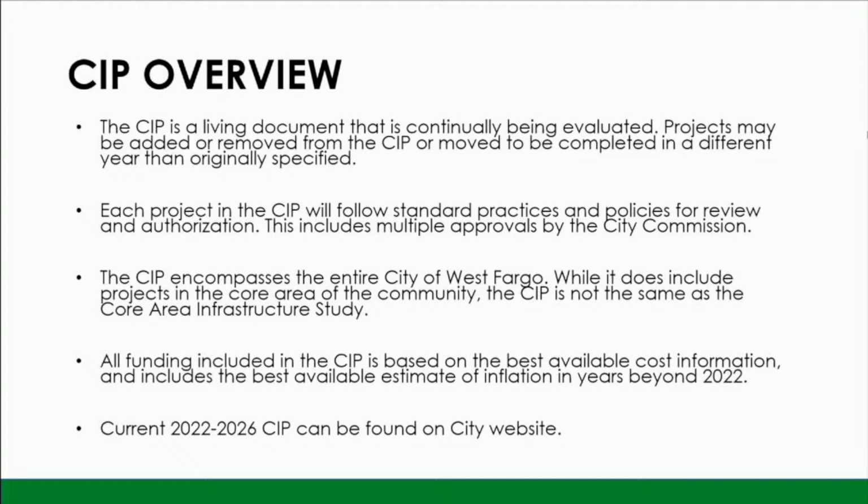The CIP is a living document, and projects can be added or removed at any stage. Each project is presented before the City Commission multiple times and follows standard practices and policies for review and authorization. As has been mentioned, the adoption of the CIP does not approve any individual project, and the adoption of the CIP allows staff to begin the process of scoping and studying projects to provide additional information to the City Commission for consideration as the project moves through its approval process.